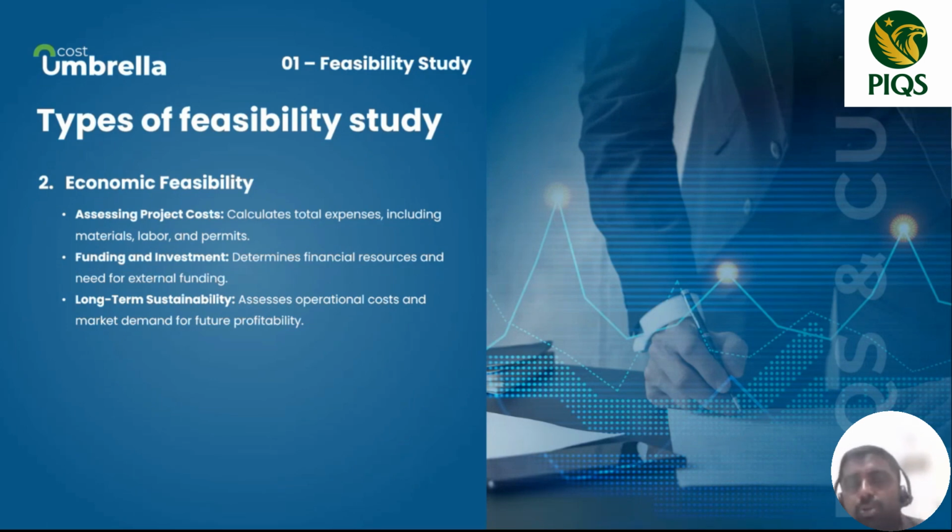So you are not able to get the real income to cover your costs. This also needs to be checked. This is also economic feasibility, because if you look at the economic or finance part of the construction, the construction cost is one aspect. Long-term cost or life cycle costing aspects also we need to cover in the economic feasibility, right?